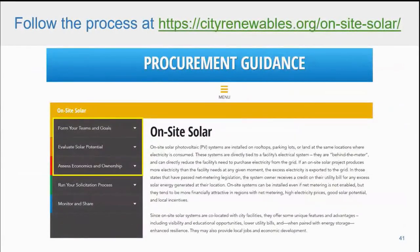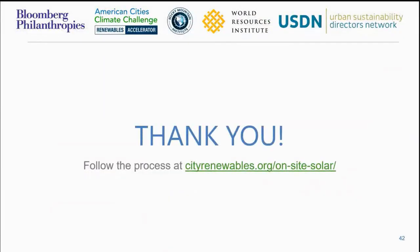Our website lists all of the information we cover on the webinars. What we recommend: from the homework last time, you organized all your sites with potential kilowatt sizes based on available area and electricity usage. Use that same file and enter the internal rate of return and NPV for each site from this economic assessment so you can compare them accordingly. You could also try to figure out a break-even PPA price using the Excel file. Thank you everyone — we'll stay on the line for a couple of minutes if you have questions, but feel free to drop off if you need to.